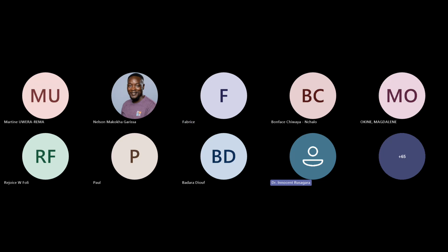And every project has to start with a project charter. Because in the project charter, it will be putting there a budget. It will be putting the boundaries, the constraints. It will be putting there a project manager. It will be putting the high-level risks which are there. It will be putting in an overall explanation. So without a project charter, you can't do anything. You can't go anywhere.